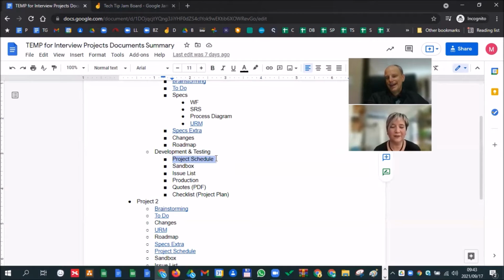A specific developer will run into a challenging problem, but we've made a commitment. So you need to put in enough buffer time so that you can under-promise and over-deliver. I think that's the big takeaway. Yes. We're not perfect, but we really try our best to under-promise and over-deliver, because your reputation is at stake. So, yes.